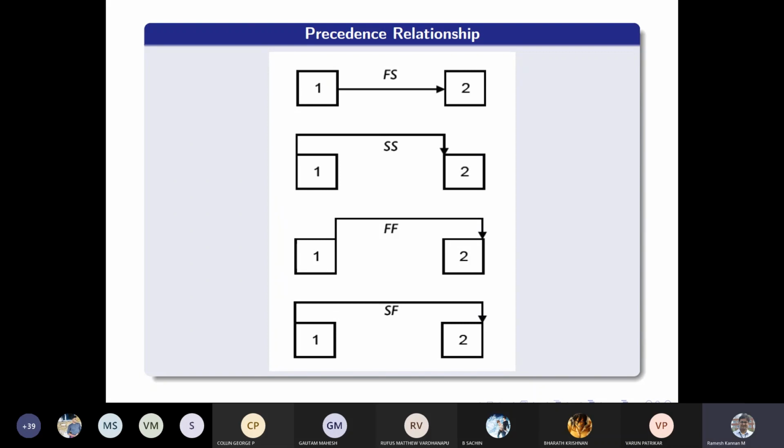You will be finishing before your FAT, which means that the DA3 end day and lab FAT can also be at the same time, or finish to finish. Both can be finished at the same time. Then start to finish. One is started, another is finishing. Something like this is the opposite of finish to start. In a finish to start, we finish the previous activity, then we start the next one. In this case, we start the prior activity and finish that particular activity, or something like that.